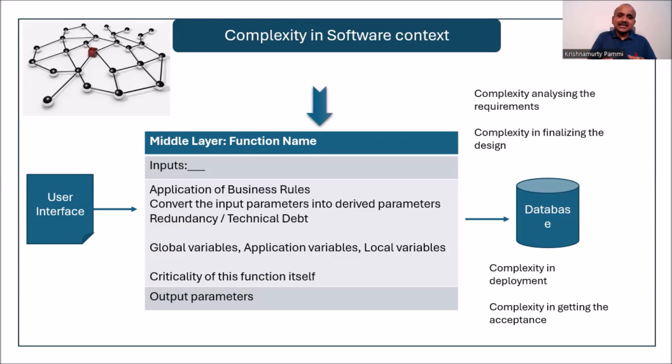Similarly, while designing mobile applications, right, the UX designer has to come well at the beginning of the project, but in some projects he will come towards the last or towards the middle. Now once you develop the application, if the UX designer joins late and starts giving the UX designs, then you may have to reorient your front end screens towards that particular UX design. So there will be rework.